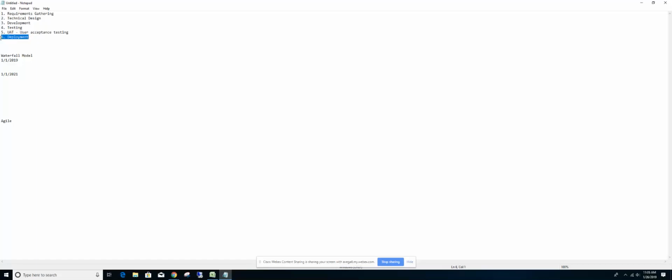All the tickets assigned to the developers have to be assigned to the testing team, and the testing team should test them and mark all the tickets as pass. Only then will a deployment team pick those tickets and deploy them. So they cannot happen at the same time. But what you said is right. I'm only talking in terms of production deployment.